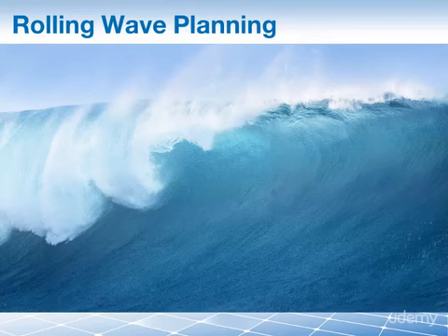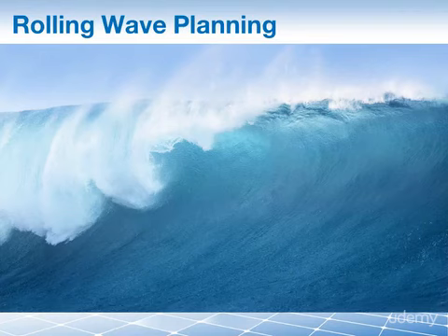Often it is not possible to foresee the future activities in a project with any accuracy over the entire length of the project. And when this happens, planning is often done in stages, with the earlier activities planned in detail now, and the later activities often left for future detailed planning. In fact, there may be several planning stages, particularly if the activity or resource requirement is dependent on or conditioned on near-term activity. Such a planning approach is called rolling wave planning.